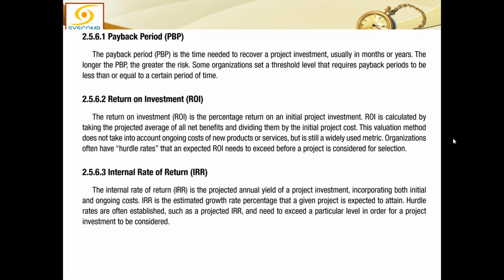So let us calculate and estimate what all money I need to invest in the project and what is the pattern of spending that money. Do I have to invest only once in the lifetime of the project, in the beginning, or will I keep investing every month or every year or whatever periodic cycle? All the monies I would be investing should be negative amounts and put aside. All the monies which I will be getting as revenue would be positive amounts and should be added together. If I add them both up, my answer should be positive.